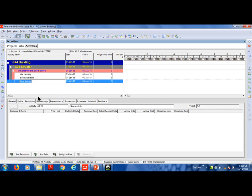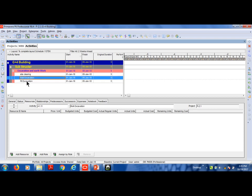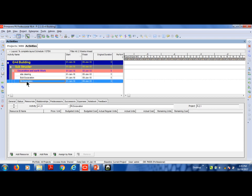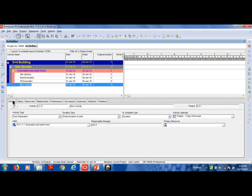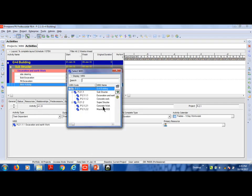Another method is right-click, then select Add. You can add activities this way. For example, you can add concrete work using WBS excavation and earthwork, then move to super structure concrete as the next step.